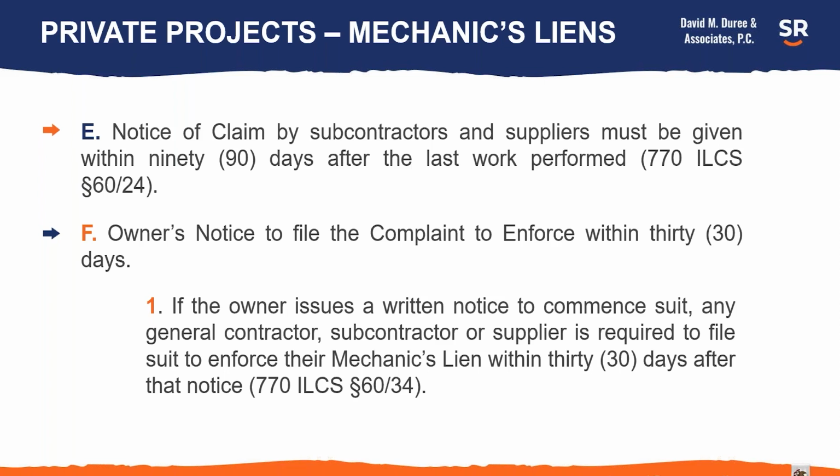If the owner sends out a notice and has it served on you that you're obligated to file a complaint to enforce your mechanic's lien within 30 days, then you have 30 days to do so, or else your time for filing a mechanic's lien expires. The purpose of that is just to give the owner an ability to resolve any claims more quickly and not have to wait 2 years to see if someone files a lawsuit to enforce their mechanic's lien.